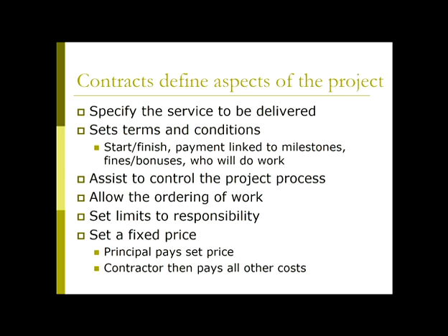Okay, so that's written into a contract, but also the time frame of the project can be controlled in the contract. So you might write in things like after 2 months, this stage could be completed. After 4 months, the next stage. After 6 months, the next stage. In 8 months, the whole thing will be completed. So stages in the time frame can be locked into the contract as well. Also, what sequence happens? So the workflow. It can be locked in as well. And of course, that goes along with the time frame as well.